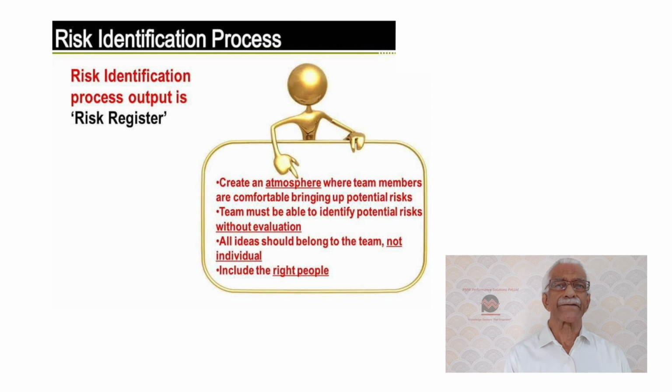A quick example could be that you have a possibility of ordering equipment for the project, and if you order in bulk, the supplier is willing to give you a discount. That's an example of an opportunity, where you take advantage of the possibility of buying at a reduced rate if you order multiple quantities. So that's the example of an opportunity.